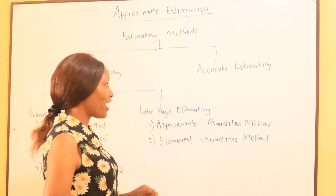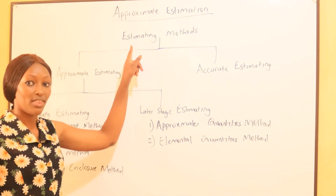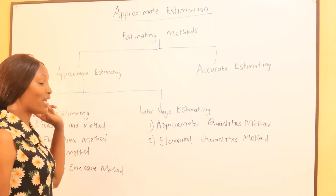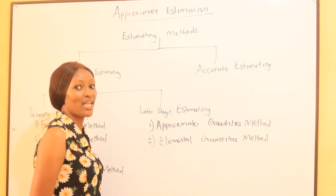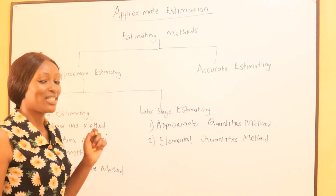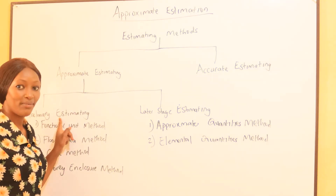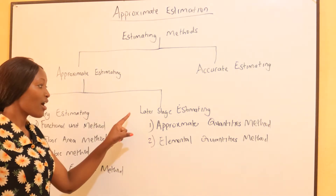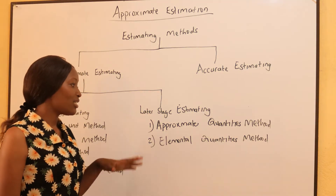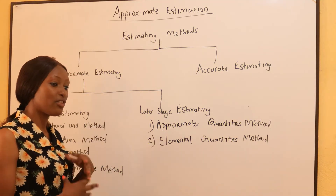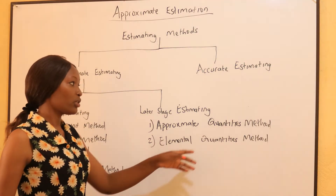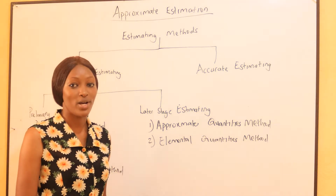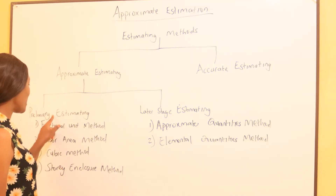Just as I have written here, we have two types of estimating methods: first, approximate estimating, and then accurate estimating. For approximate estimating, there are preliminary methods — used before you have the full details of the drawings — and later stage estimating methods, used after you have the full details of the drawings but not as accurate as accurate estimating. For accurate estimating, we mostly use the Bill of Quantities.